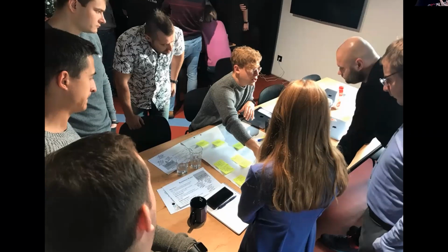You see the slide is actually like business rules. It's written here. This 21 user story splitting approach is printed. That was the thing we gave to the guys just to train themselves in decomposition. We made a lot of rounds of small decompositions for different backlogs just to train. And the next day, as far as I remember, we had the real product backlog refinement.